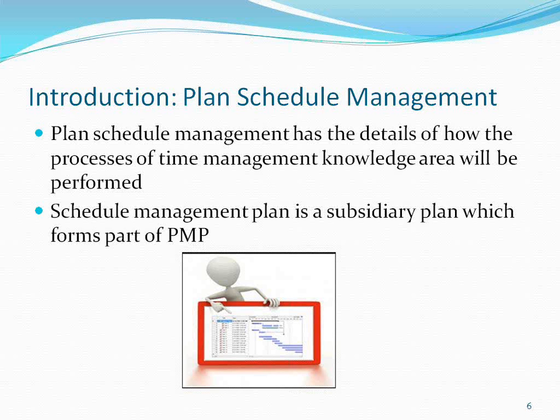And level of accuracy you will plan upfront. In the schedule management plan, you will develop the level of accuracy. Level of accuracy means plus or minus 1% delay, I agree. Plus or minus 5% delay, I will agree. What is the level of accuracy you are looking at? For some people, plus or minus say 1 or 2 minutes delay is fine. For some people, even they don't tolerate that. So, what is the level of accuracy you are expecting in the project?